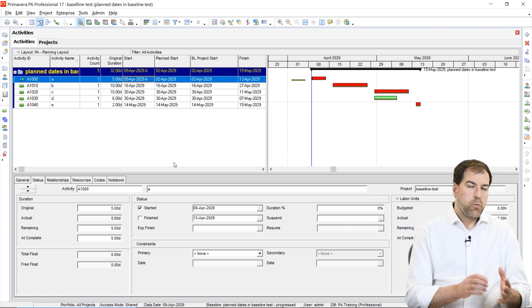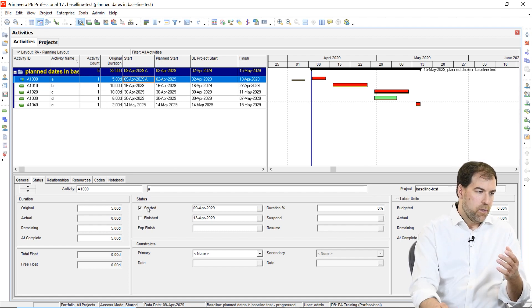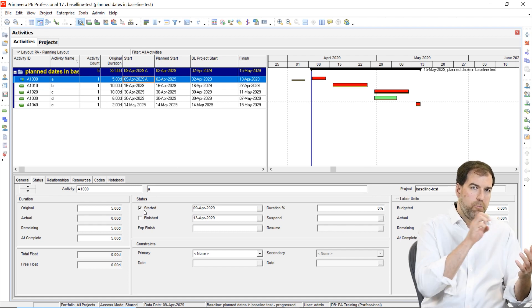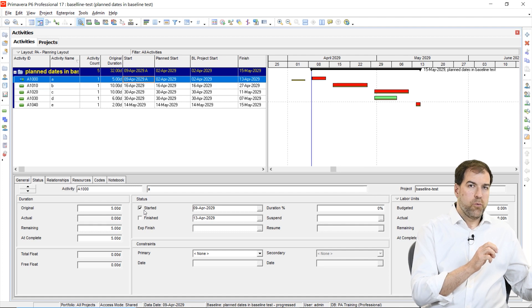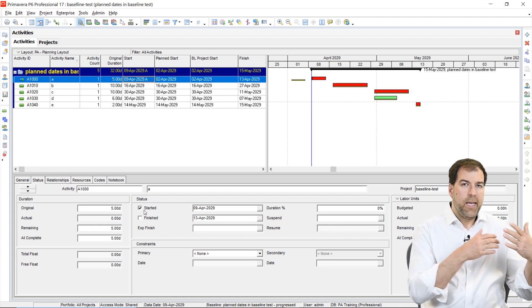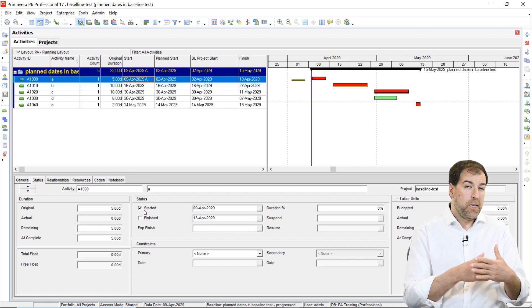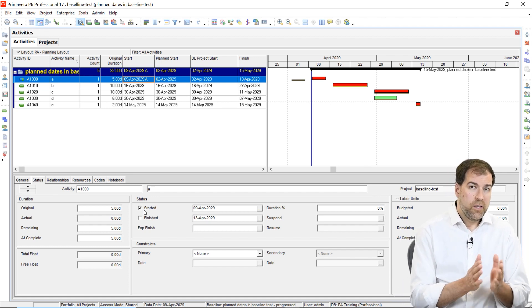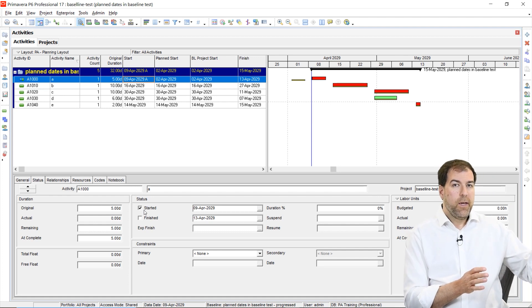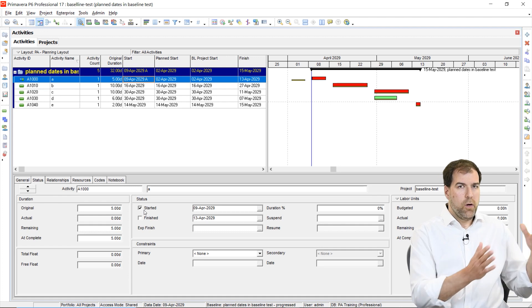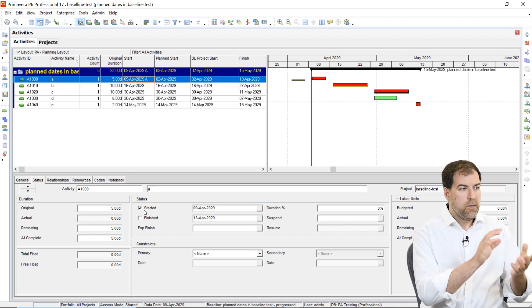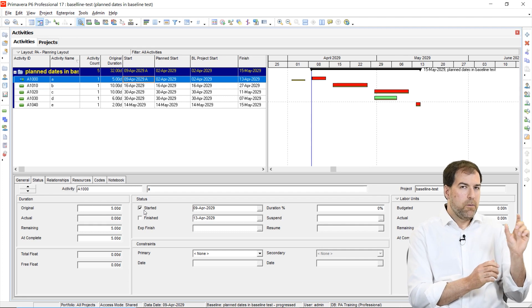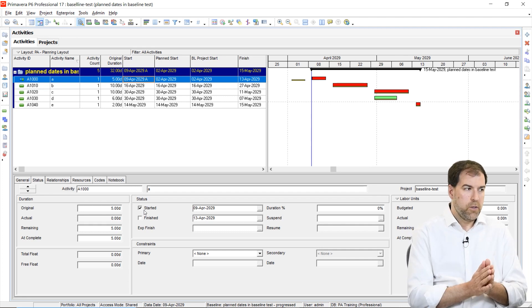What happened is when I clicked start on that activity, when I started to progress it, P6 actually captured the planned start date and stored it as the original date. And then it put that into the baseline and then the baseline started to show us those values. So you can see how this is a problem. And in fact, if I had a whole schedule, a much longer schedule with more dates and things that didn't start on time and whatnot, you could see how my baseline bars would actually start to be really out of sync with the project.